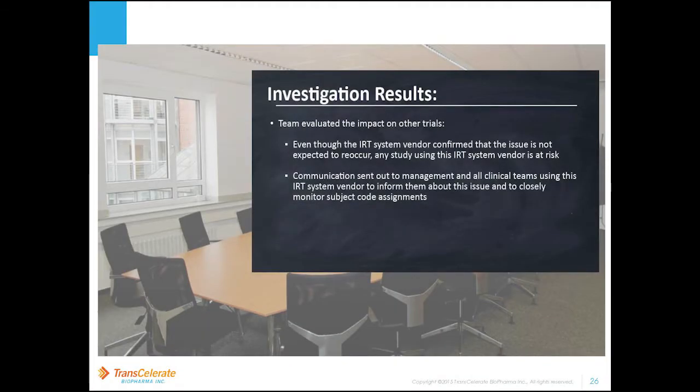The team evaluated the impact on other trials. Even though the IRT system vendor confirmed that the issue is not expected to reoccur, any study using this IRT vendor system is at risk. A communication was sent out to management and all teams using this IRT vendor, informing them of the issue and asking them to closely monitor subject code assignments.